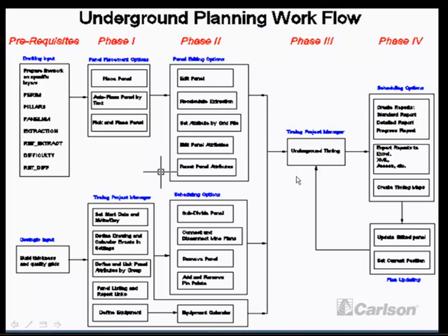Then we take this information and we run the underground timing, where we assign the panels to be mined to the equipment in the sequence we want to mine. We kick out reports, and after the mine plan's been created, sometime in the future, say 3 to 6 months or whatever time has passed, you can then set a new start point for your mine plan, new start date, and rerun it again and generate new reports there.